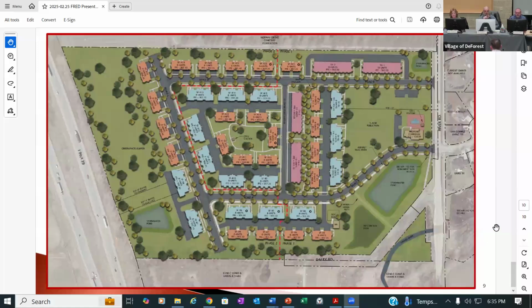Out of curiosity, do you know when you're hoping to break ground? I think we are scheduled sometime in June. We still have a number of steps to go through: CARP-C, MMSD, DNR. That's kind of what we're targeting, so the earlier the better as far as we're concerned. Hoping for rent by the end of the year, or is that going to be a spring thing? It would be spring.